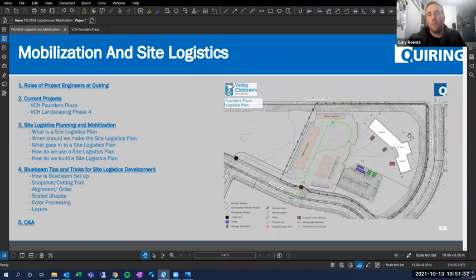Yeah, Sam, that's a great point. You have to remember that this is like a perfect scenario idea. On a construction project, the site logistics is always evolving to the need of the job itself, right? So you might be storing lumber on one side, but still working on concrete on another. There are going to be things shifting around, blocking, having to move for access. And the first thing that came to my mind with the dotted line here is, you guys plan to take 53-foot trailers in there with material, to be able to unload and turn that truck around and get back out, because you can't block the hospital traffic. So you have to take that into account.